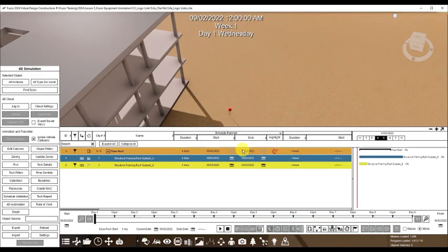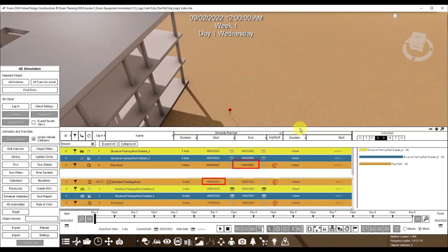If you select Yes, the closest dated macro construction task will become the parent for the microtasks. This macrotask date has been changed to the date of the original macrotask. If you select No, the closest dated macro construction task will try to match the start date of the removed task. The end date will be calculated based on this macrotask's original duration, which is 4 days after the 9th of February, 2022. For the microtasks, their dates remained unchanged.